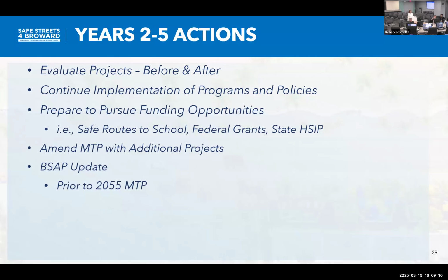In 2 to 3 years, we expect to do an update to the BSAP, probably not a major update, but probably data and revisiting some of the projects that then will feed into the 2055 MTP. Because this year, the 2050 MTP was done before the BSAP, and so they're holding a place for us. But in the future, we want to be ready ahead of time. So that's a cycle that we'll be pursuing. And then maybe in 8 to 10 years, we do a major update again.